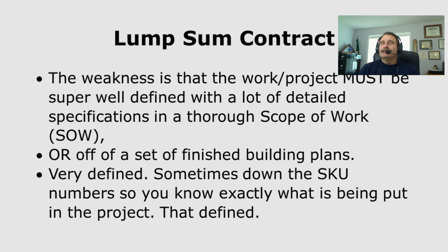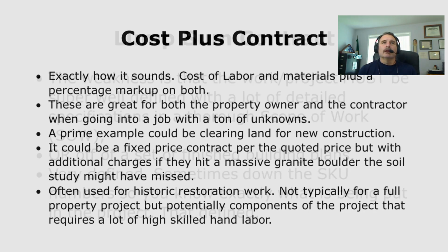The very thorough scope of work and everything associated with it also helps prevent change orders. Change orders are everybody's enemy. No good contractor likes to mess with change orders. We're trying to go into this with the decisions already made, and the only change orders would come up with regards to some kind of hidden something that just wasn't covered in the scope of work, such as finding an asbestos pipe that didn't seem to come from anywhere.